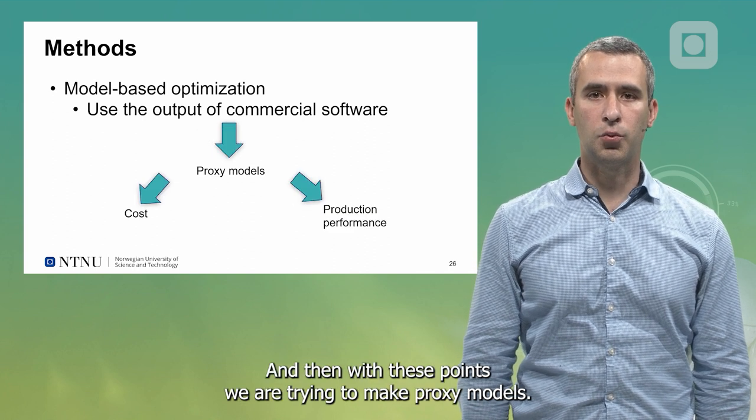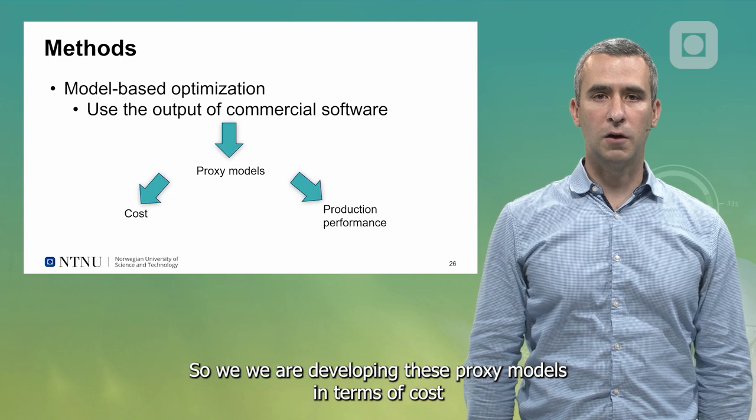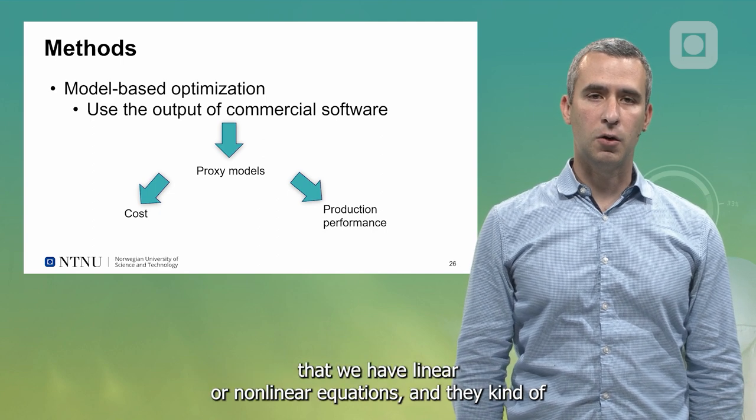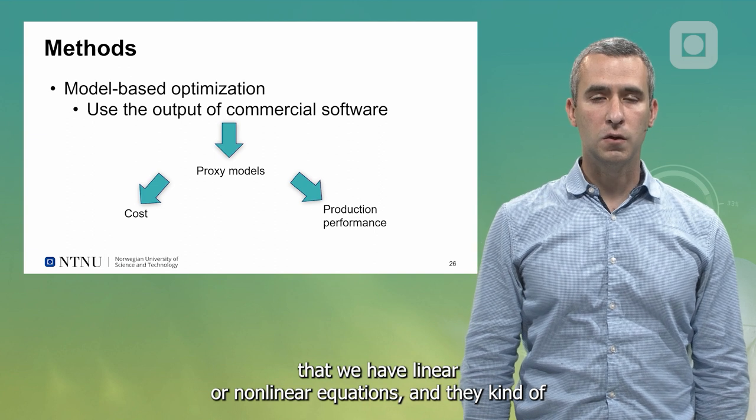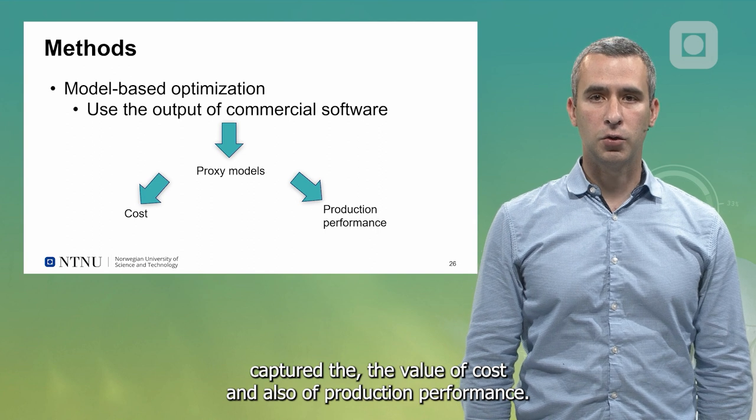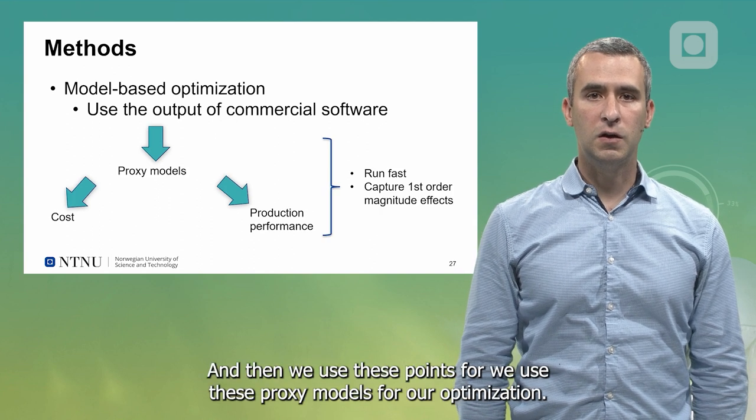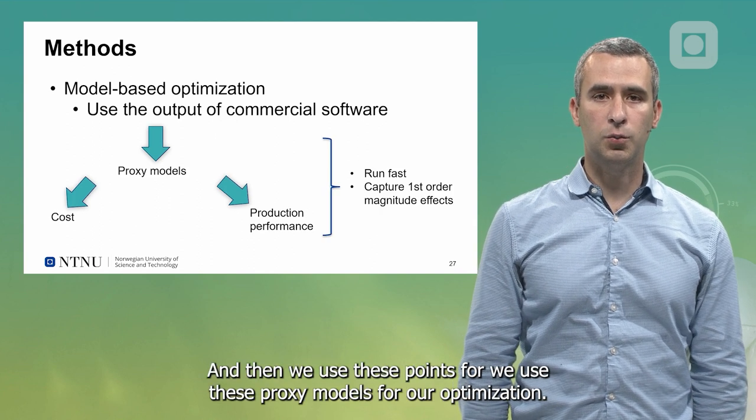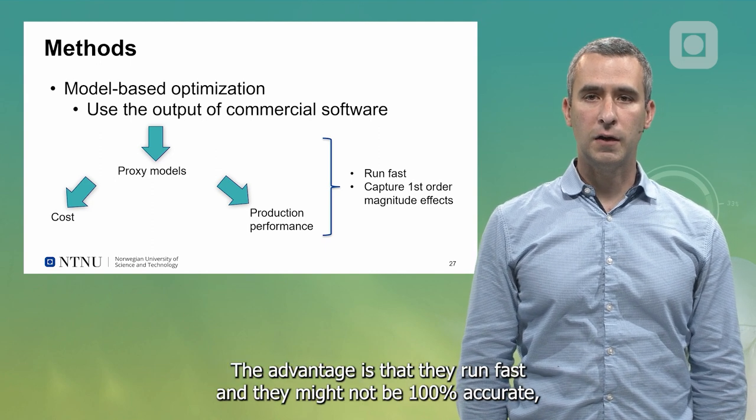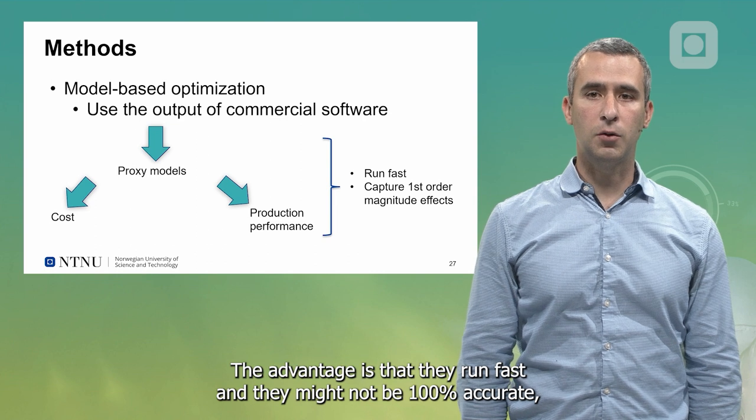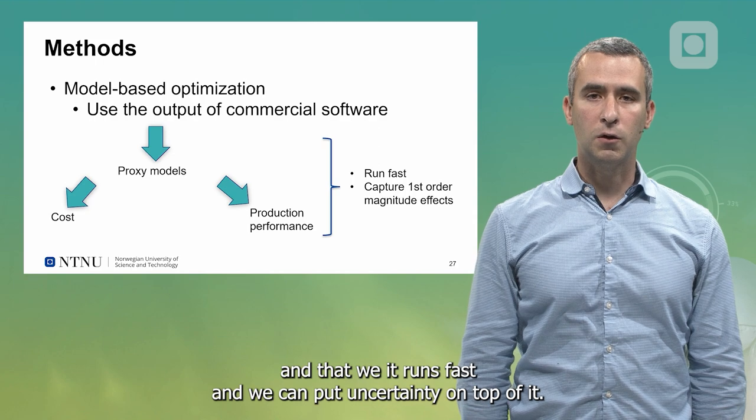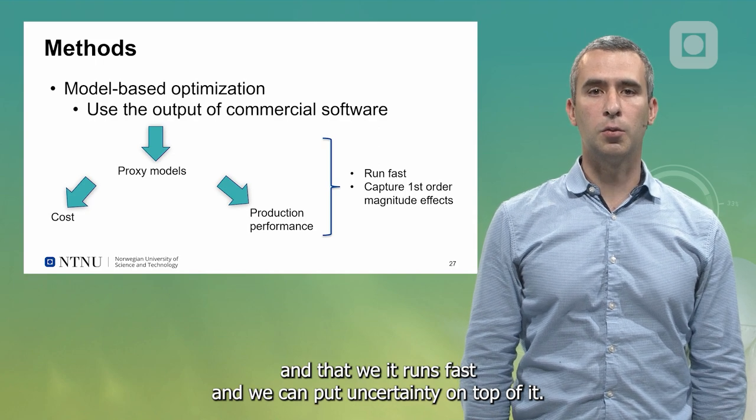With these points, we are trying to make proxy models. We are developing these proxy models in terms of cost using linear or non-linear equations that capture the value of cost and also of production performance. Then we use these proxy models for our optimization. The advantage is that they run fast and they might not be 100% accurate, but they capture first order magnitude effects, they run fast, and we can put uncertainty on top of it.